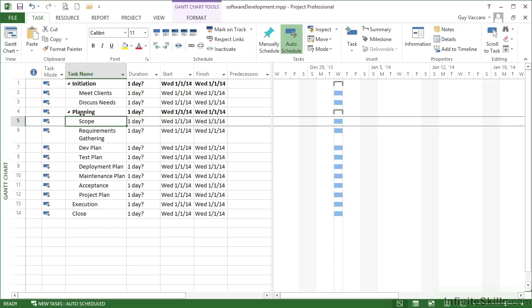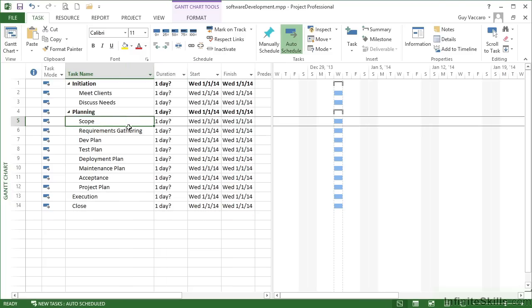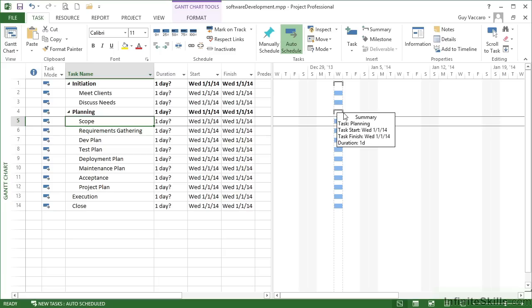Now you can see how the indentation is going to work. We have initiation as a phase heading, planning as a phase heading, and then each of the sections within. Requirements gathering has wrapped because it won't fit, but I can widen the column so that it does fit. Over in the Gantt chart, we can see everything is defaulting to a day, so we get a blue bar for each of the days, and then the headings, these summary tasks, have a little overlocker icon because that's going to stretch from the beginning to the end of that particular phase.